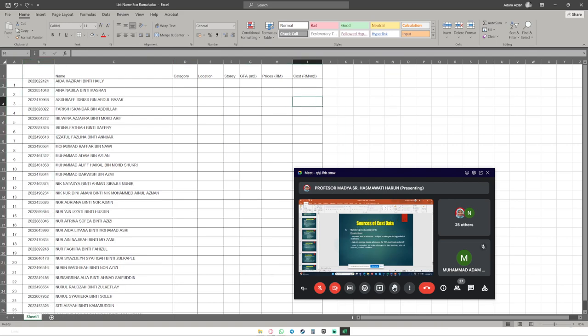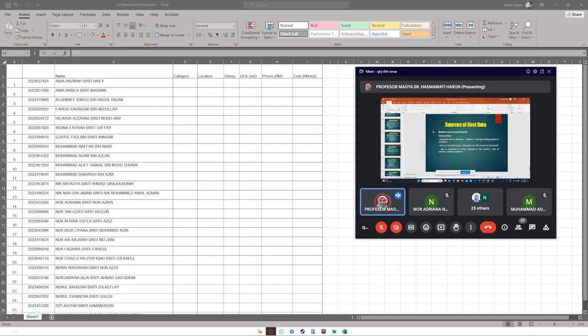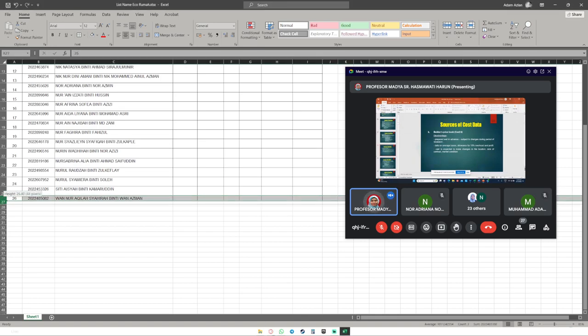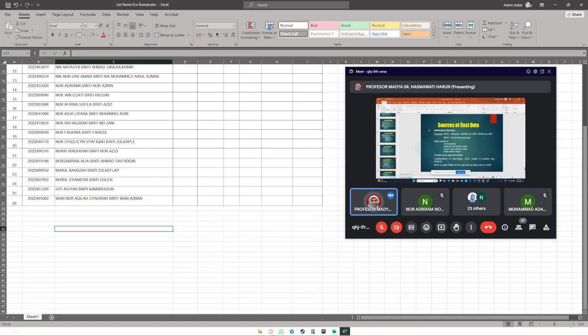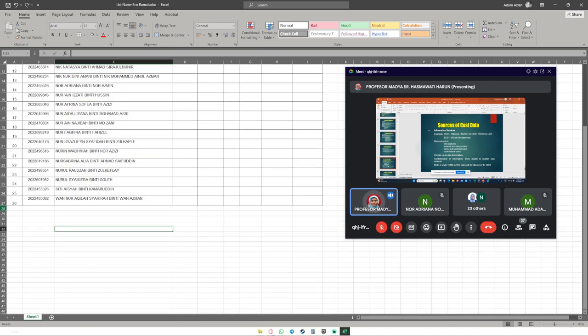The disadvantage when you have it in a price book, you document it in the price book, it is prepared in advance, so it's subject to changes in terms of location, market condition, contract condition, etc. So you need to adjust. Okay, you need to update and adjust if you got it from the price book.